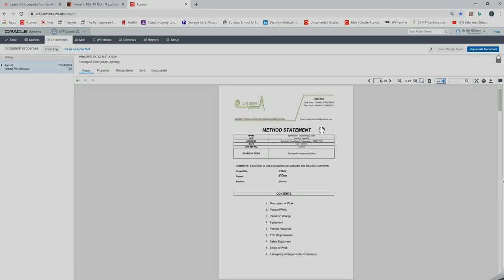So we don't even have revision, we don't have document name, we don't even have the document title. Oh, sorry, no, we do have the document title over here. That's the only thing we have. So, you know what? Any reasonable, sensible, brilliant document controller would reject this. It goes on the QA reject, send it back to the person and say, hey, put this document number here, put the revision on there as well. It's a revision 0, put the revision on there, and then resubmit.